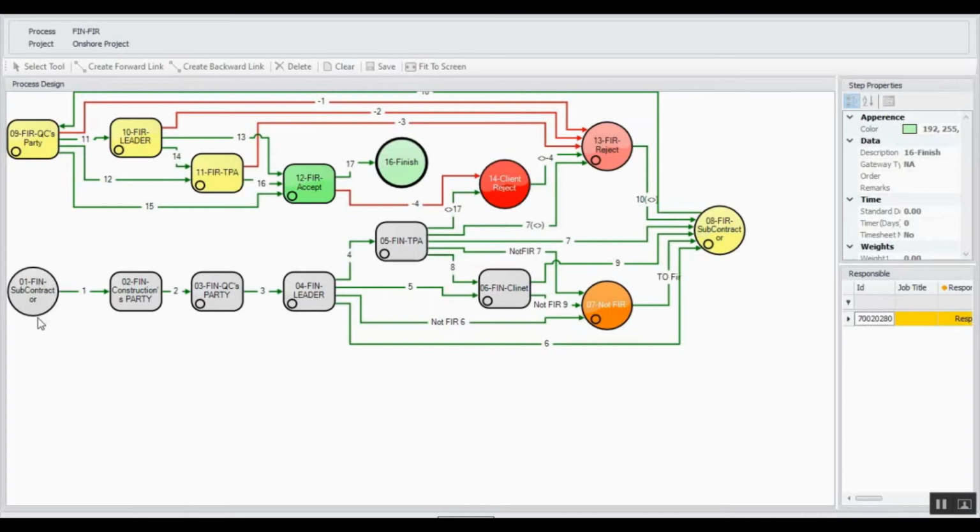First of all, the subcontractor will issue an activity as an inspection notice and send it to the third party. It is worth mentioning that the system checks over 3,000 conditions in this list. And the system will automatically detect the appropriate recipients based on the entered sub-activities and class, which means for each step we have different recipients. After that, the responsible person will be notified and the process continues.